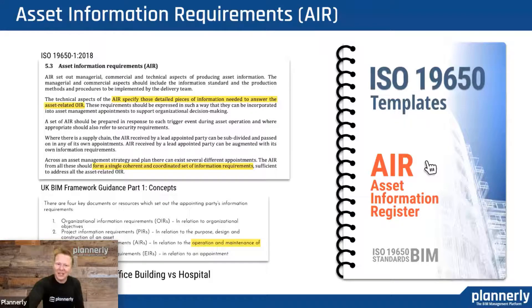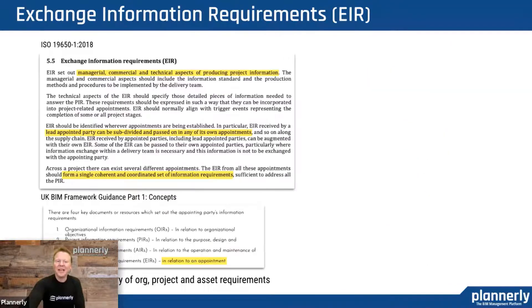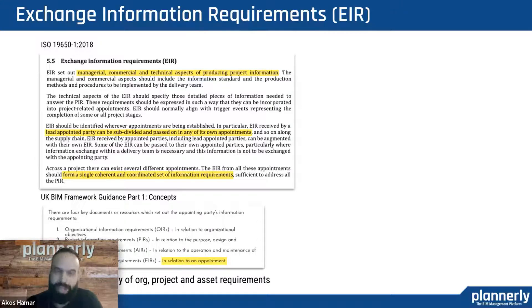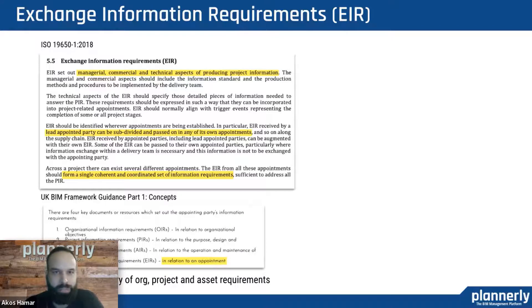We have a list of potential assets and a comprehensive list of all the elements we might have inside the building. When it comes to exchange information requirements, that's the combination of the previously mentioned organizational, asset, and project information requirements. This is really a contractual document that the appointing party sends out to potential project participants to tender on, and they return their way of approaching and executing the project. We do have a template for that, but ideally you might want to use your existing documents or use the OIR, AIR, and PIR documents we provide to assemble your project-specific EIR in the application.